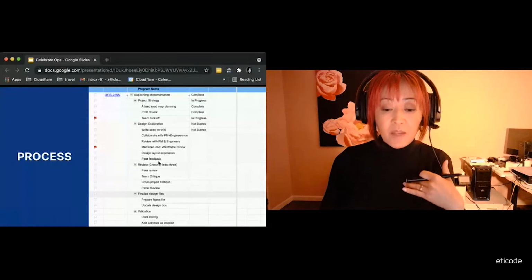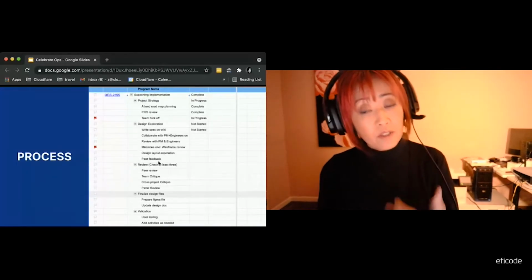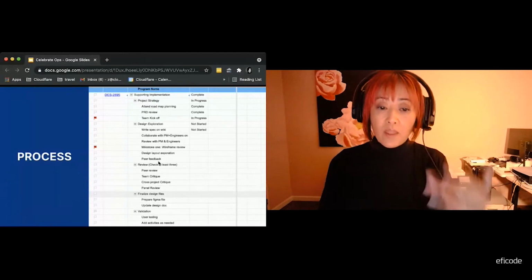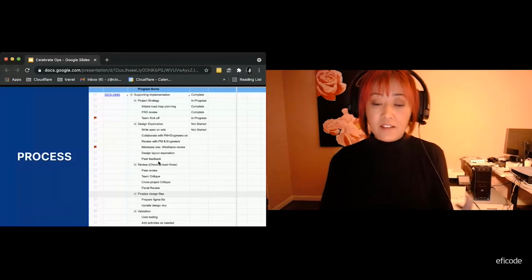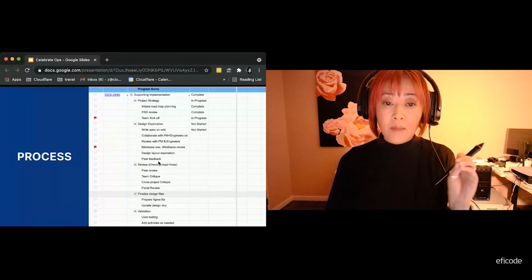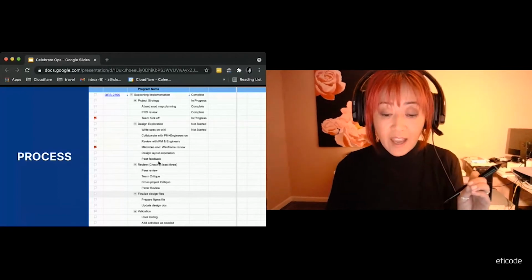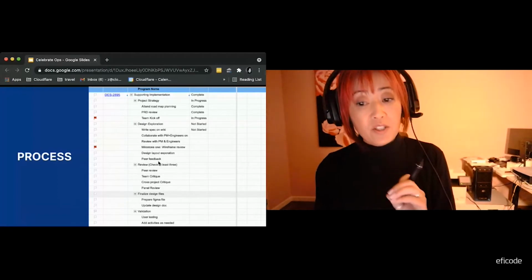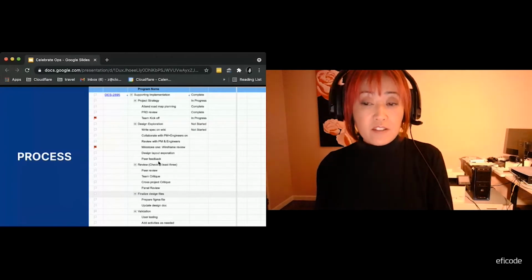A lot of the time, the delivery managers will really focus on when's the due date. And so when things happen, this is not a set date. It's really a signal to tell people, hey, this is the time to have a conversation. If that date changed, we need to take a look at: do we really need to push the deadline, or do we have to revisit the scope?